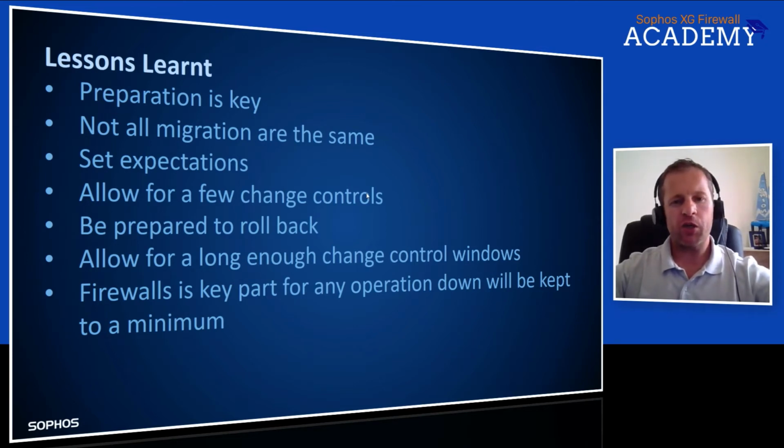So set expectations of a change window. Don't just take a half an hour window. Set yourself an hour or 2 hours for the change window so that you can properly prepare and install the XG and make changes as you need to. So know the environment and prepare properly. And then allow for a few change controls. You might not have a successful change the first time around like we did. Be prepared to roll back.